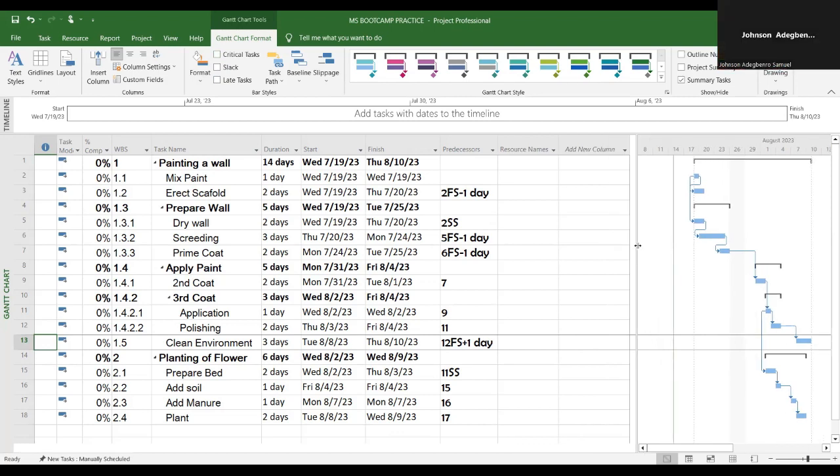Now, the first thing to do when you are assigning resources, if you want to take note, you can just take note, but I think it's in the slide. There are 3 things that you must know. You must have your BOQ or material and labor schedule. You must populate your resource sheets. Then you assign resources to subtasks. I say you must what? Have your material and labor schedule. You must have your BOQ. You must populate your resource sheet. Then you start assigning tasks.